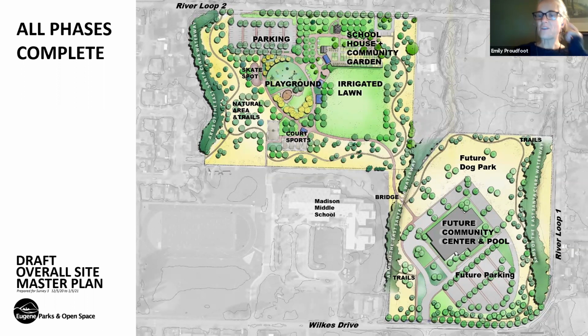I'll add, I've been the project manager for the Downtown Riverfront Park, and I've learned some things about archaeological surveys and thinking about history on sites. And I think, likely before we did a ton more work on this site, we would probably have an archaeological survey performed, knowing that there are sort of homesteaded artifacts out here. So if you're working just in the state and you don't have federal funding for a project, which we're not planning on for this site as of yet, the artifacts, if they're 75 years or older, then they are of interest to the state as far as historical artifacts go.